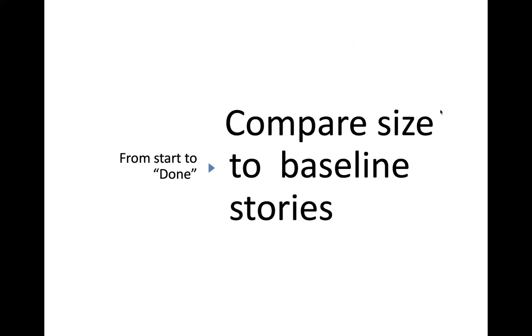Now, as we discussed on the baseline stories, we have to discuss with the team which one is our baseline story. Whenever we are doing a planning meeting, we should always use one baseline user story. It should not be the case that every new sprint we take new baseline user stories and discuss them with the team.